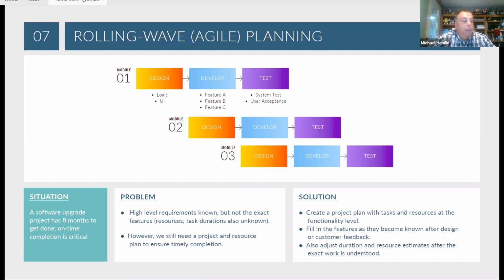We also see this a lot of time in maintenance, where the repairs that I have to do, whether it is in aircraft maintenance, or vehicle maintenance, or whether it's in shutdown and turnarounds for refineries or steel plants or something like this, while I can design the roadmap and put in some high-level activities for doing repairs, I don't know all the details of that until I've actually finished my inspections. So this gives me a way to, again, build that roadmap and add my details later.